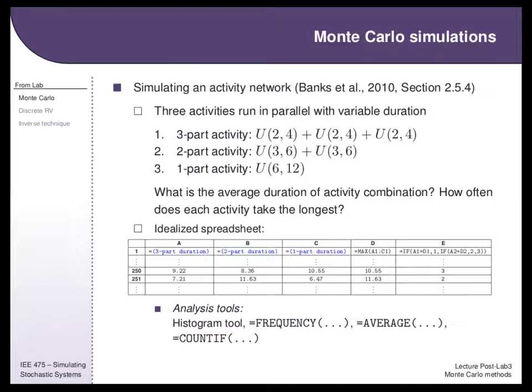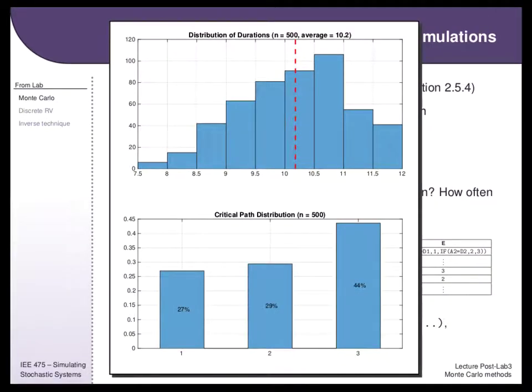And that allows you to get a distribution of critical times as well as a distribution of which path was the critical path. And when you do that, the surprising thing, in the distribution of critical times and the means of these, is that the mean is higher than 9, even though the mean of each individual path is equal to 9.